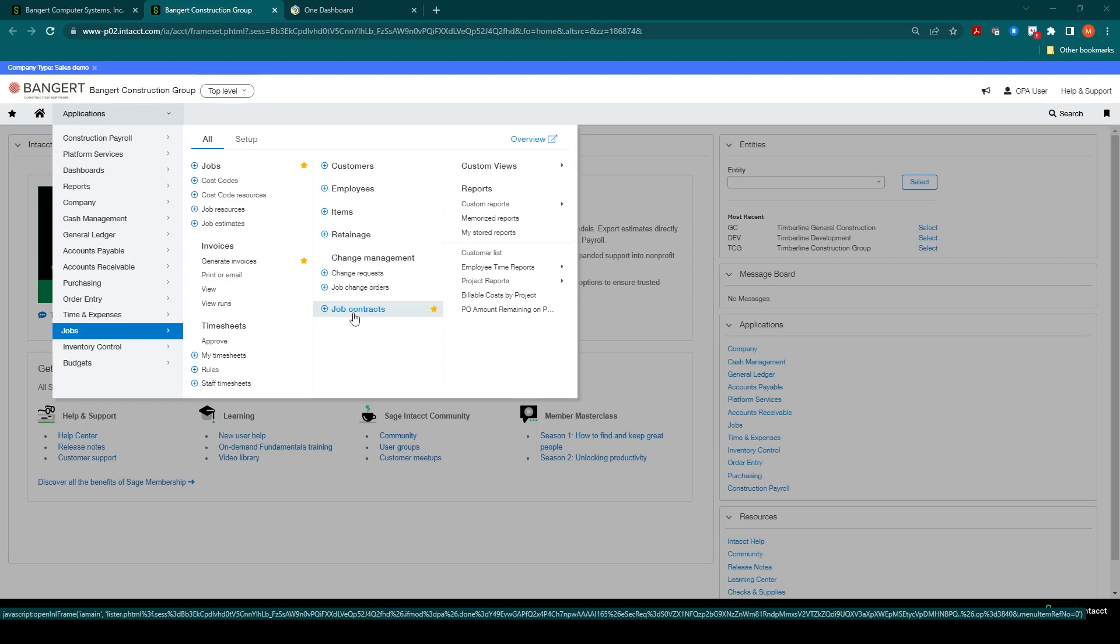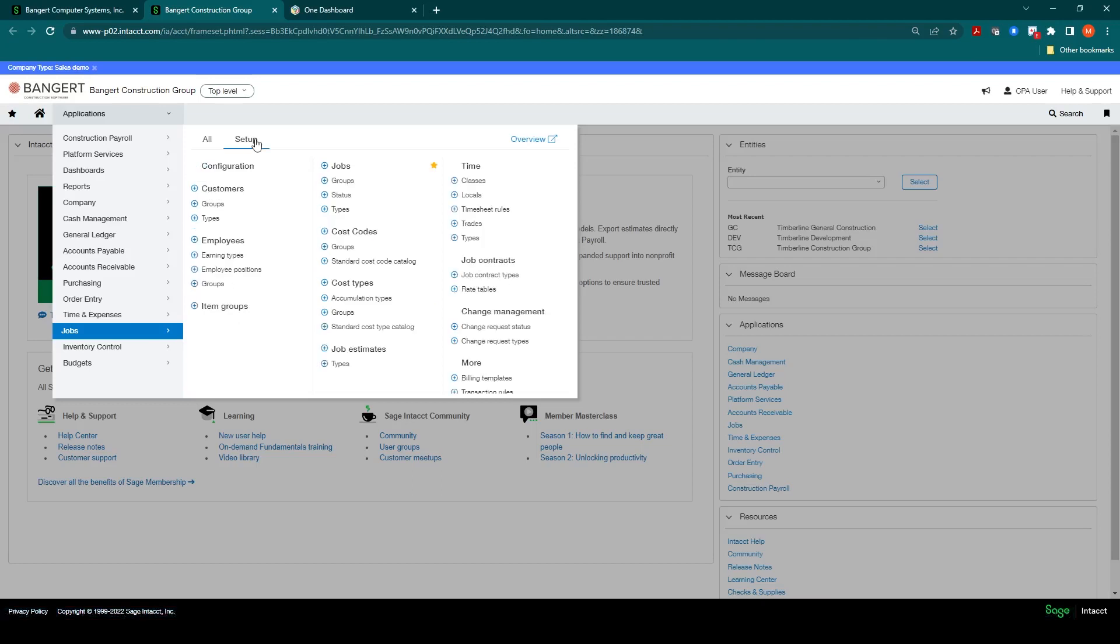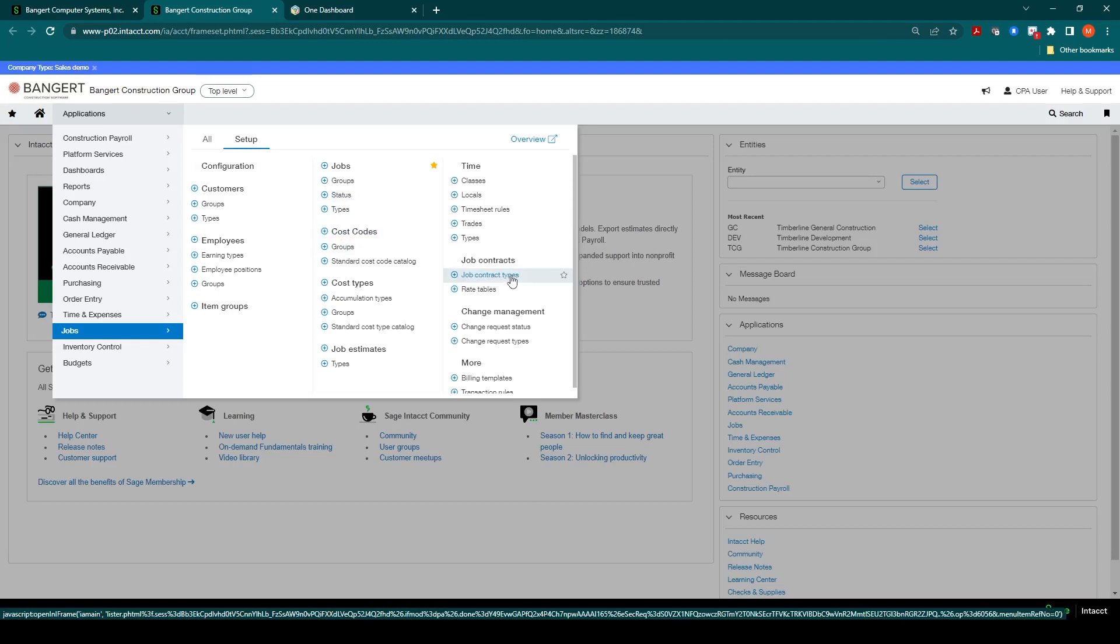You can define job contract types to help report and separate out contracts during the billing process. These will be located under Job Setup Job Contract Types.